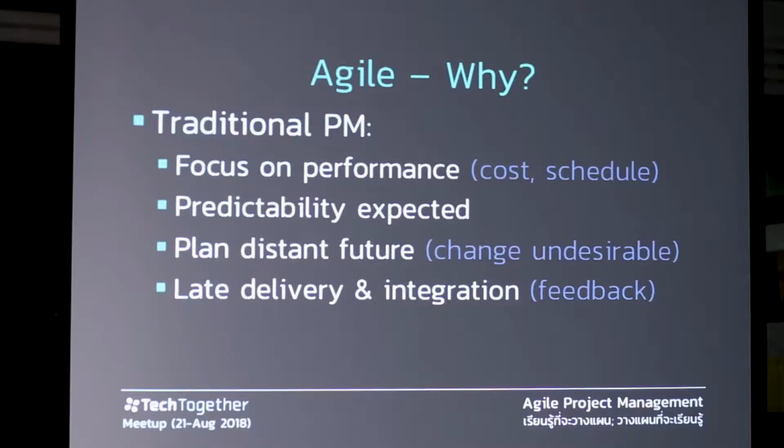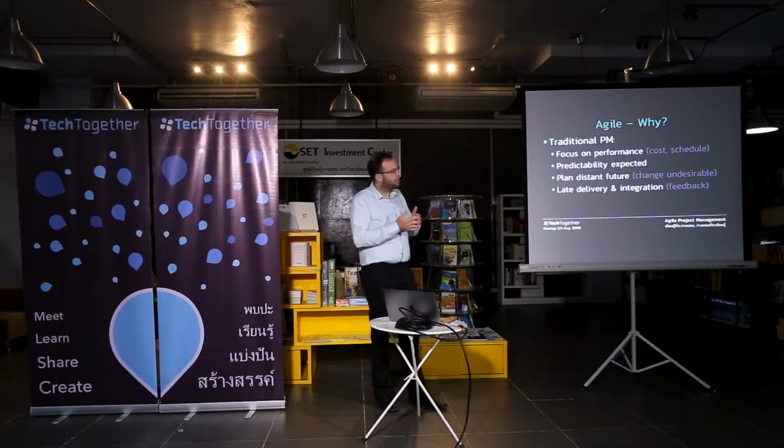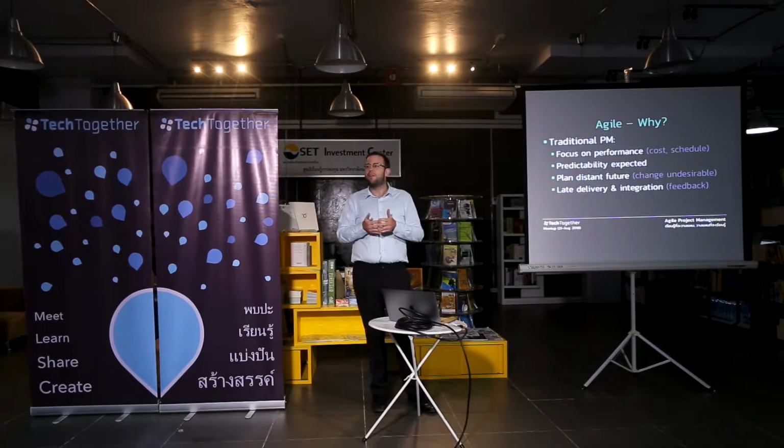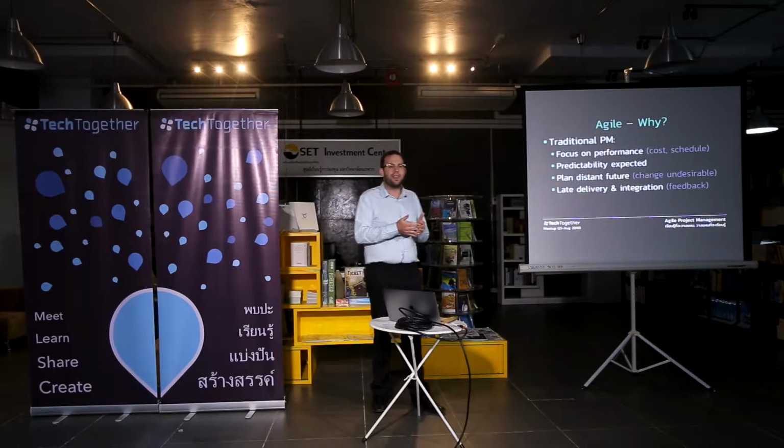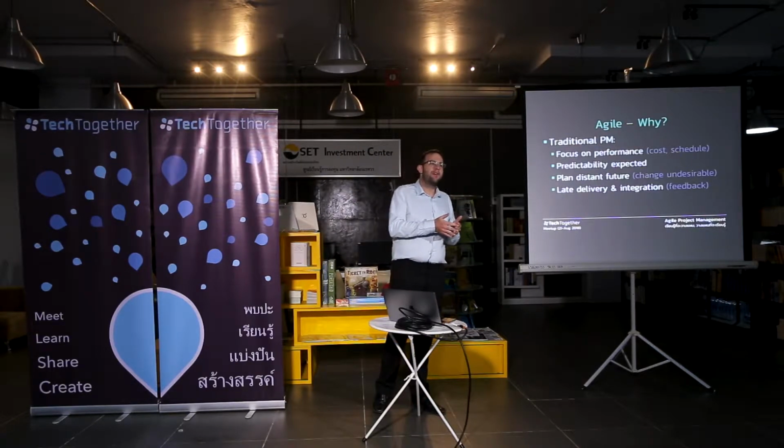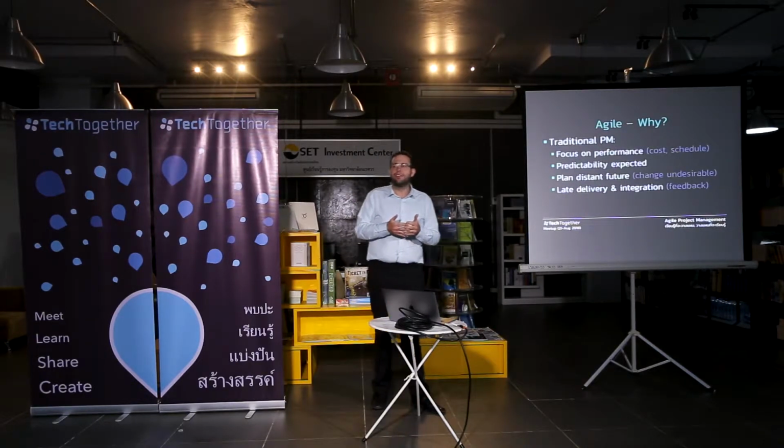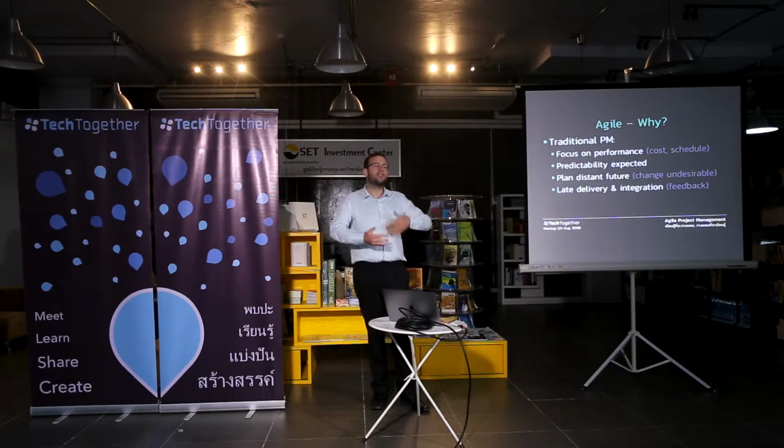And this was the final point from the previous slide: the point at which you truly deliver and you truly integrate your product is quite late on. This is the point where you need to verify you've done the right thing. If you don't verify early on, you build the wrong thing, you have lots of rework, you have to go back, your schedule's longer, your costs go up.